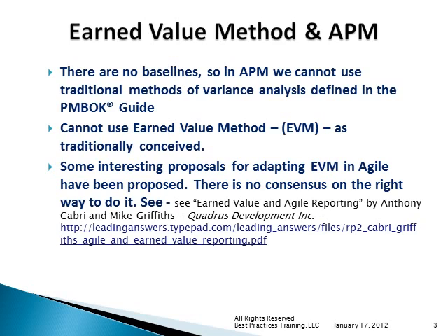We don't have this time-phased budget, this S-curve showing an estimate of budgeted completion for the end of the project, since we don't know how many iterations we're going to go through. So we can't do the normal earned value computations of schedule variance, cost variance, the performance indices, and the forecasts, EAC, ETC, TCPI, and such. So we can't do that.